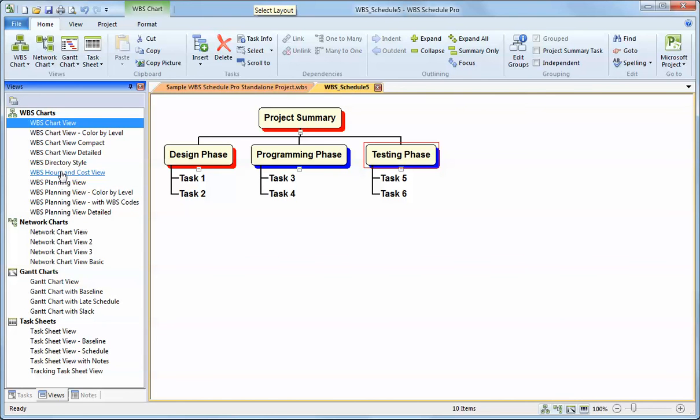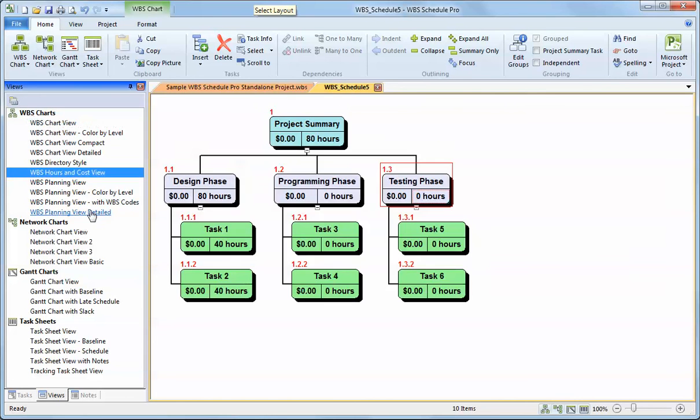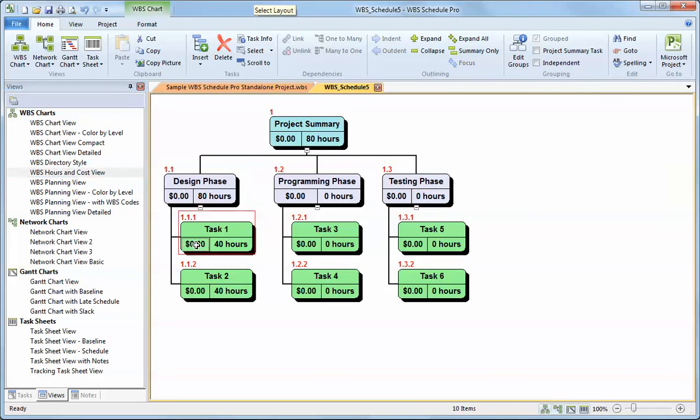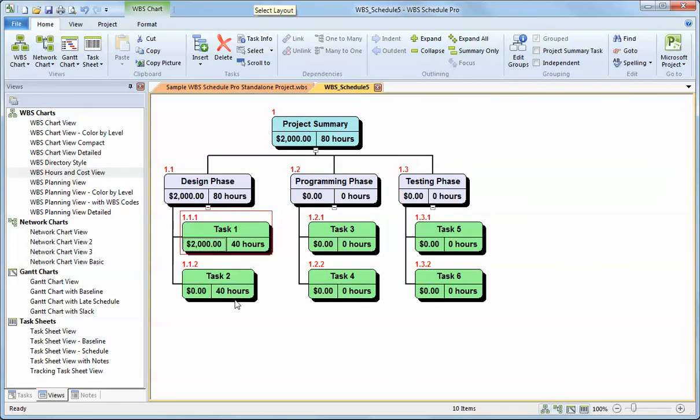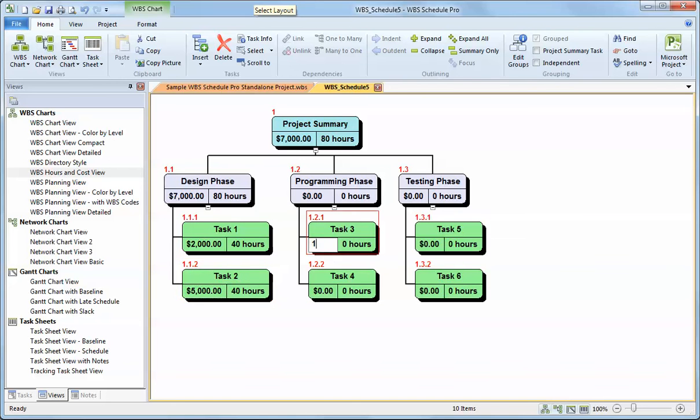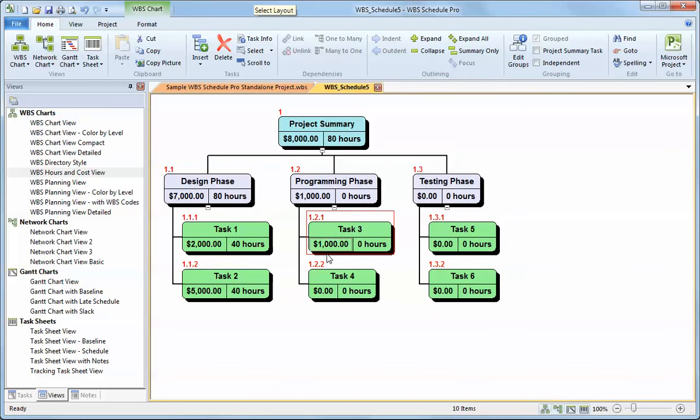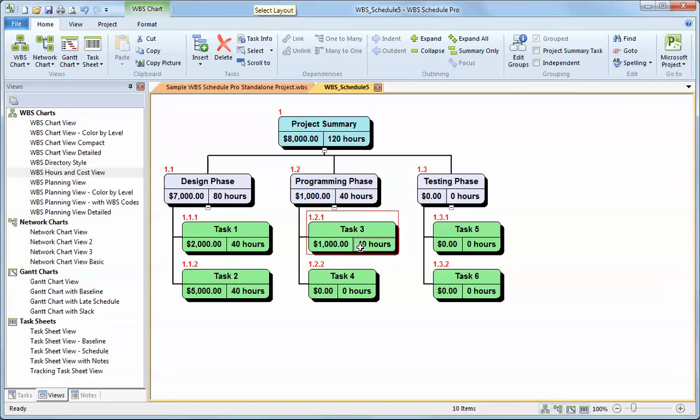This particular view here, the hours and cost view, is a good view for entering, like it says, hours and costs. So if I wanted to type in a certain number of costs for a particular task or a certain number of hours on a particular task, I can do that here. And then I can see how the information rolls up.